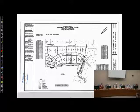No, and all the signatures are required with the exception of the town engineer and the secretary's signature. I was by there today, and there's still utility work going on from LCUB and KUB. Are you far enough along with that they are willing to sign off on it? They have signed off. Okay. And Mark, as far as you know, there's nothing as far as the engineering department? Well, they just need to get the stop signs installed. Is that a punch list item? That's on engineering, number 8. So maybe that's still remaining, 1 and 8. For y'all's information, I've been advised that the stop signs will be picked up at 8 o'clock in the morning and installed tomorrow.